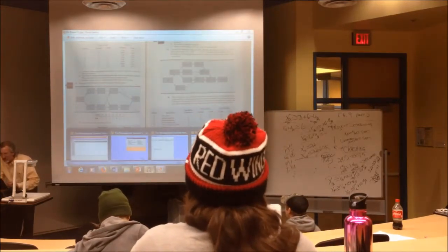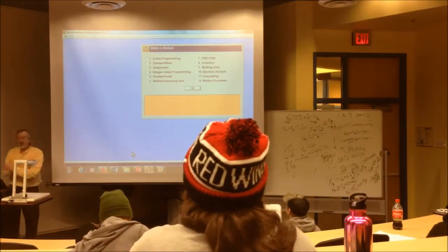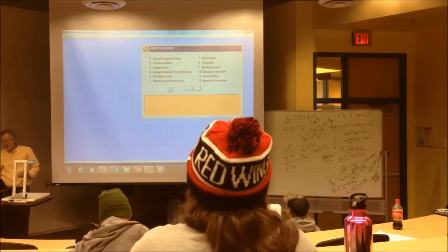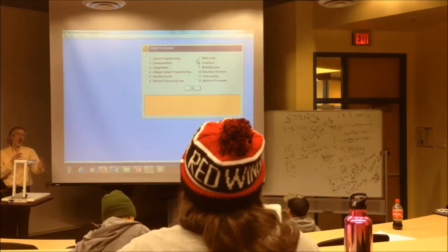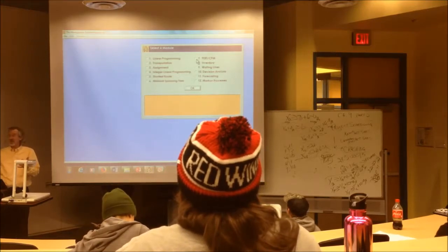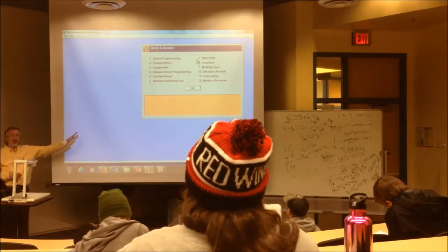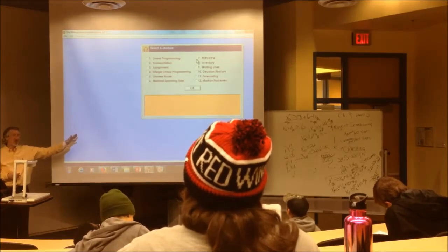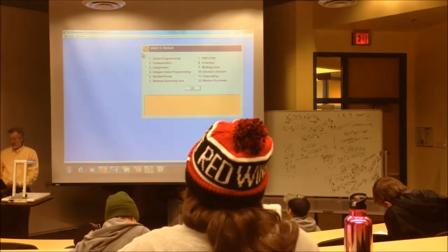Wait. There we go. Here we go. You ready? Here's our crashing problem. You can't use PERT/CPM to do a crashing problem. It will do a known activity time problem. It will do an uncertain or estimated activity time problem, and we demonstrated uncertain activity times already last week, right? I want to do crashing. The only way to do crashing is you've got to use the linear programming module instead.